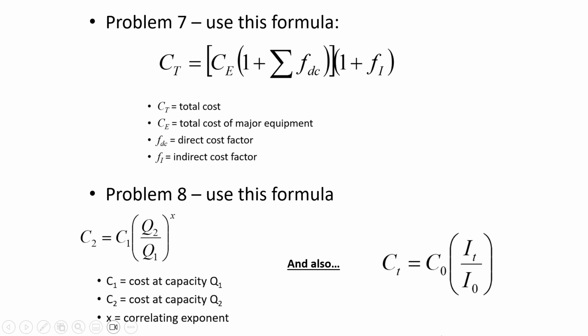So I think our example today has the same thing, where it's cost capacity combined with cost index. And so cost capacity is describing difference in size for the item you have data for versus the item that you're building, whereas cost index accounts for the changes in expense over time.